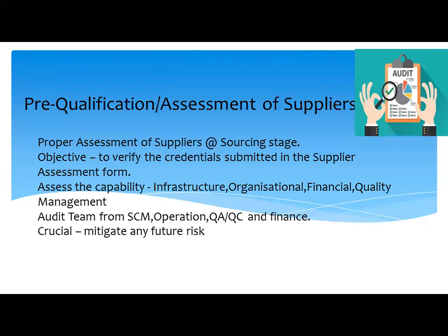Assessment should ideally be done by a team comprising representatives from supply chain, operations, quality control, and finance. This is a very crucial activity prior to placing an order, and if not carried out diligently, this can lead to serious problems in future in terms of delayed delivery, defective supply, etc.